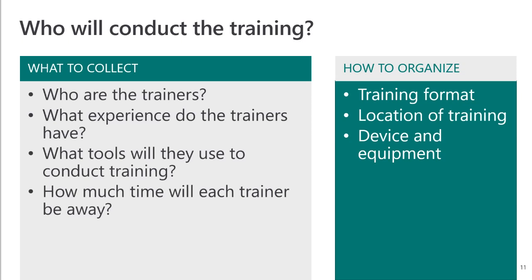Because those factors and those considerations will need to be included in your plan. If most of your trainers don't have experience with the tools that you'll be using, you're going to need to train them how to use the tools, and that takes time and effort as well. You'll also need to consider how much time each trainer will be away from their regular work if you're using your business users as your trainers.